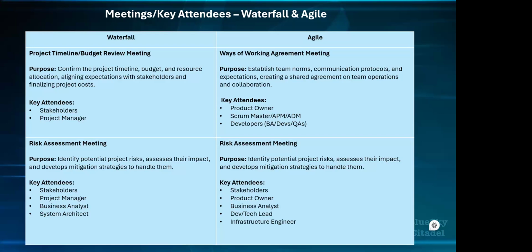Okay, so for some projects, there are times when some teams, in preparation for risk assessment, also do risk awareness. What risk awareness is, is to gather everyone involved in that project, the development team, everyone that is involved, and say, okay, we have a risk awareness document, could be a spreadsheet and all that. If there's any risk in your own expertise that you think might happen for this project, identify it. The project manager might not be able to think about all these risks.